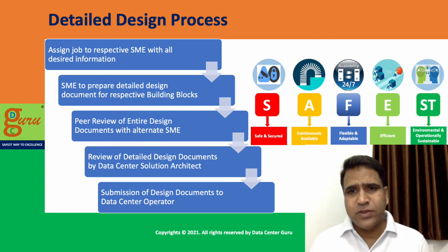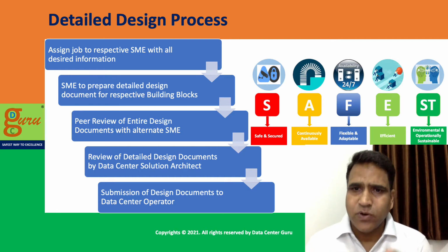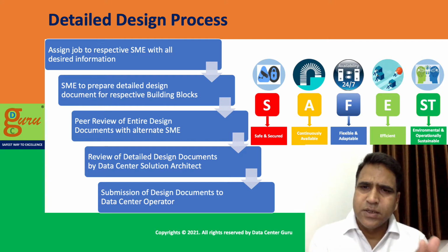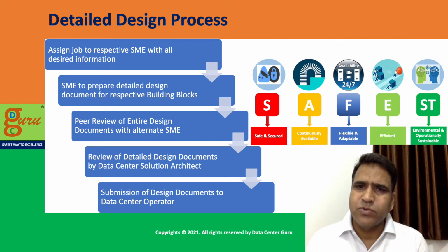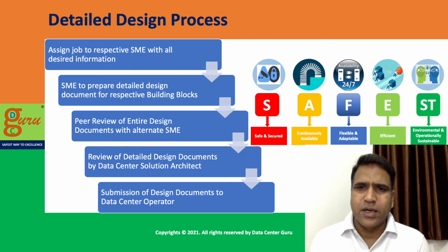Then, based on that information, the SME needs to prepare a detailed design document for that block. What are those? It is broadly like, first they have to do the sizing, the capacity sizing. The overall framework is already there in the concept design, so they have to prepare a detailed schematic or single line diagram.